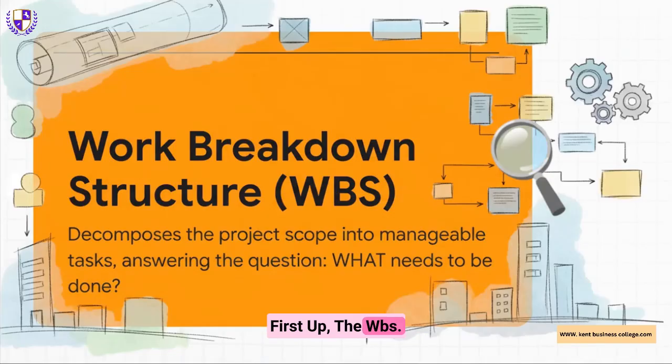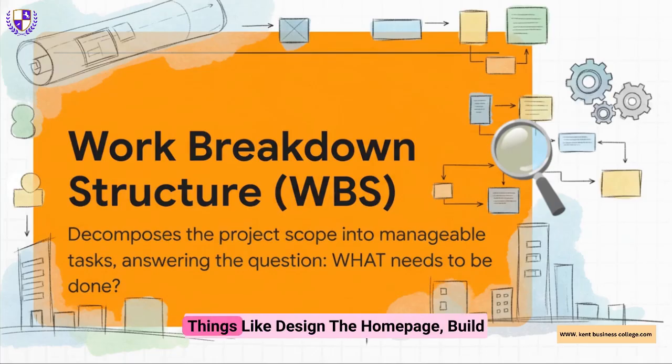First up, the WBS. This is your foundation. Think of it like this. It takes the entire project scope, let's say launching a new website, and it chops it up into smaller, manageable pieces. Things like design the homepage, build the shopping cart, test the checkout. It gives you a crystal clear answer to that first question, what are we actually building here?